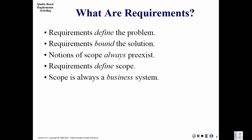In project reviews, we look at to what extent requirements define issues that weren't raised by the project charter. The risk is that you've gone into areas where, had you known in advance, you might have included other stakeholders or altered the project constraints. Requirements aren't meant to be the specification of the solution — they're the articulation of the problem. You can't lock that down until everyone agrees on what the problem is. It's a very organic process: if you can't change your direction in response to learning during requirements, something's wrong with the requirements process.